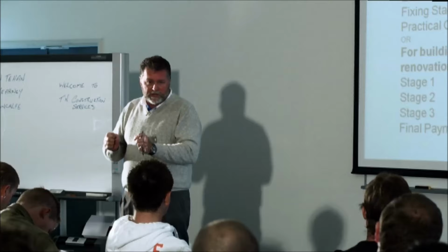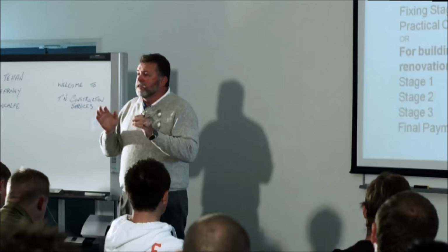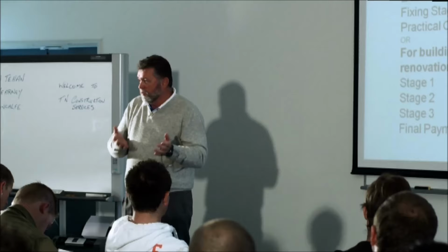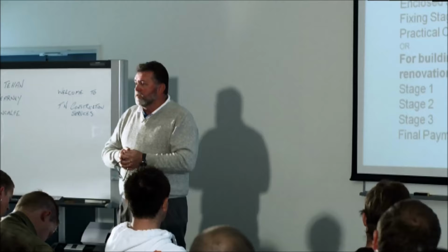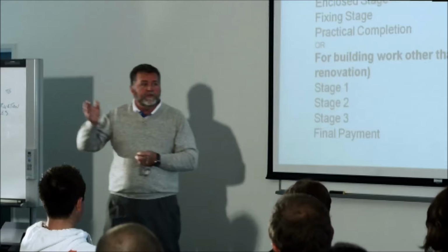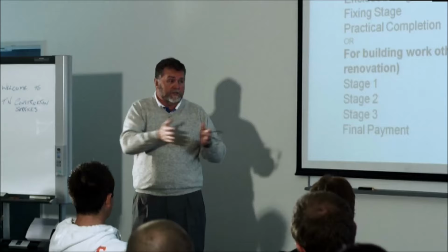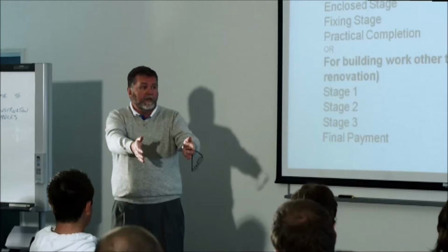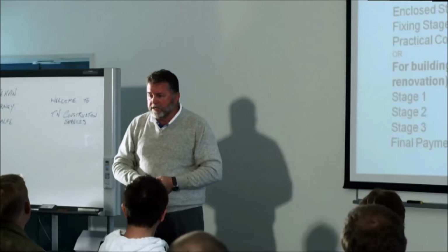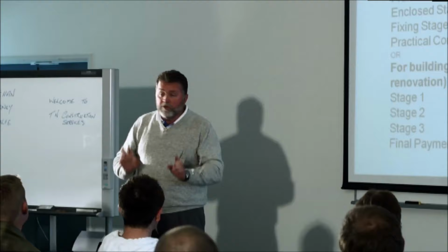You've seen the blocks and everything they do, everyone's seen those? Get him to site it, even if part of his work is to put in the stumps, the steel posts, whatever you want, then you come in and do your part of the work. But when do I get paid? You get paid for the work you do. The owner is going to engage the house removalists to do the slip and slide and the siting, so that's a contract between the owner and the house removalists. The builder is now going to come in, get the subfloor downstairs done, get the walls up, get the weatherboards on, whatever. So the owner is doing two contracts.